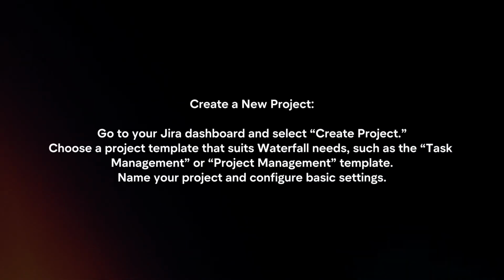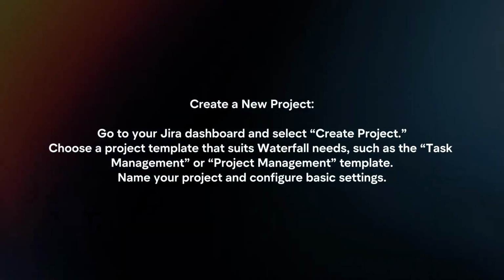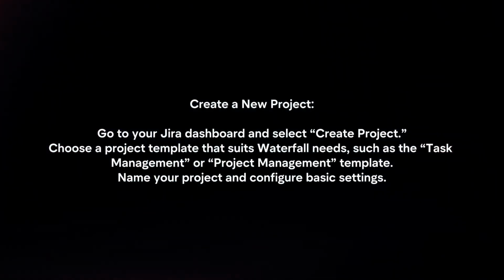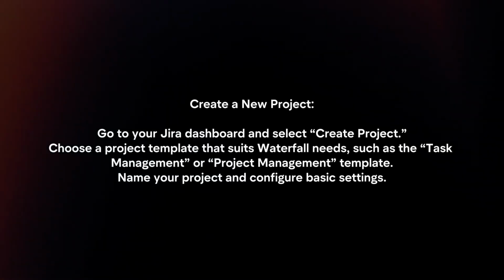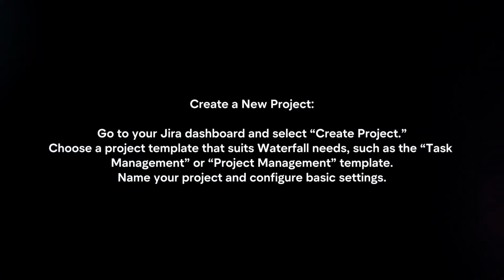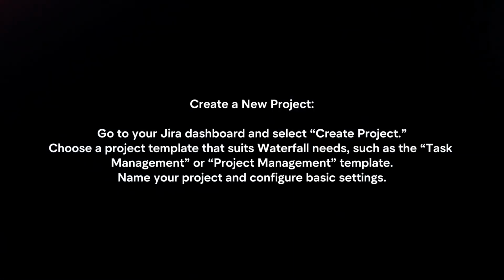Create a new project. Go to your Jira dashboard and select Create Project. Choose a project template that suits waterfall needs, such as the task management or project management template. Name your project and configure basic settings.